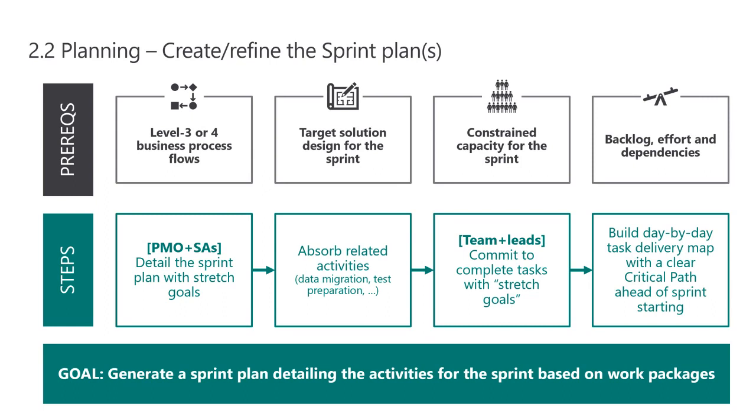In other words, in that sprint plan, you've got nothing there that says this is a 60-day effort, right? Because the chances of you being able to estimate something that takes 60 days across 4 people is relatively low, right? You're not going to be that accurate. Whereas if you've got a sprint plan which says this is going to take me 2 days, this is half a day, this is a quarter of a day, you're much more likely to be accurate. You're much more likely to identify the right dependencies. You're much more likely to complete the task on time.